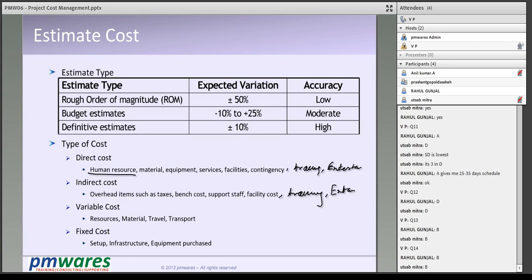Now general training is happening, overall development of the employees, HR training, communication management. Training for communication management, not specifically for this project, is basically an indirect cost. A general entertainment is happening, some party the organization has called, it's not specific to the project. That entertainment also has a cost, and a factor can go to the project, and therefore it could be an indirect cost.